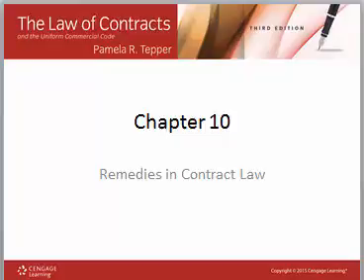So, to summarize what we've talked about today, there are 2 general types of remedies, legal and equitable. Legal is a monetary remedy, whereas equitable is non-monetary. If money damages will suffice, equitable remedies are usually not available. The type of injury will dictate the type of remedy. With regards to legal remedies, we have compensatory, consequential, punitive, nominal, or liquidated damages. Equitable remedies include specific performance, injunctive relief, rescission, reformation, restitution, and reliance. Remember that parties are required to elect a remedy when more than one remedy is available but they are mutually exclusive. Compensatory and restitution damages, for instance, are mutually exclusive, and therefore one must be chosen over the other.